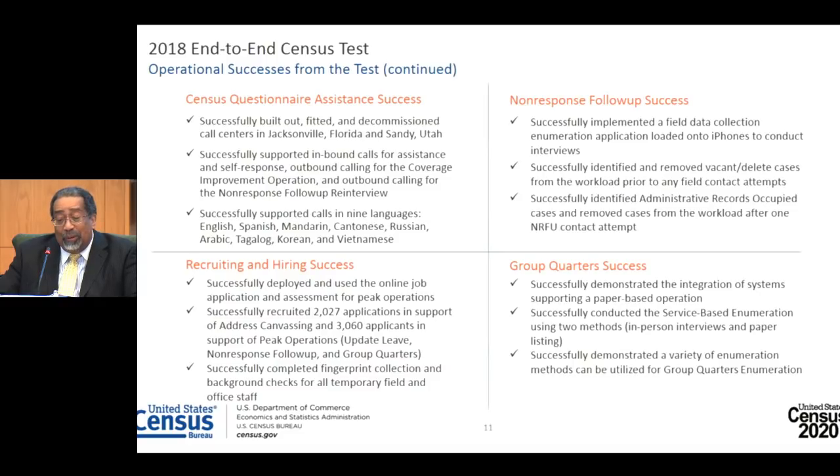needed before the test. We deployed 735 enumerators to fill 70% of our model goal of 1,049. But the increase in productivity from 1.05 to 1.56 units per hour more than offset the staff shortage. If we used the new productivity, it would have said we needed to deploy approximately 706 enumerators at the beginning of the operation. We actually deployed 735. But we're not going to depend solely on productivity increases to offset low unemployment numbers throughout the nation, and we need to encourage applicants in other ways.